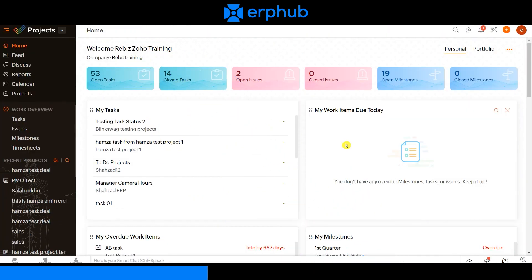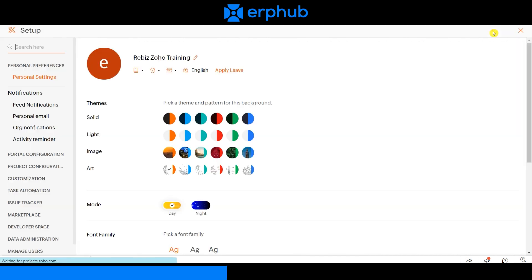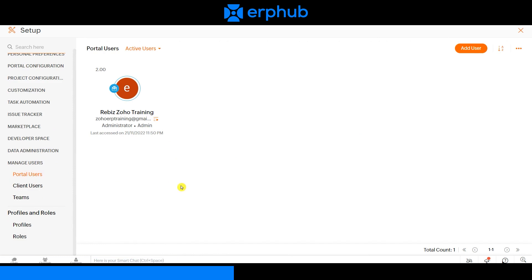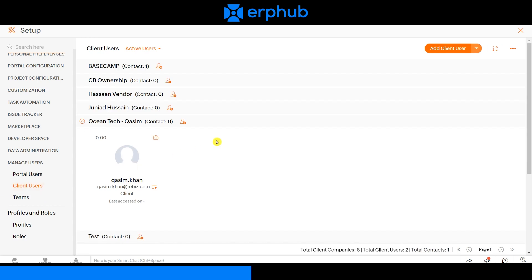We are currently on Zoho Projects. Before you begin using Zoho Projects you need to add users onto your system so you can assign projects to your team members. To manage your users, navigate to the setup icon on the top right corner, scroll down to manage users, and under portal users click add user — it will take you to Zoho One where you can add new users. If you have clients that need to view and engage with projects, you can add those users as well under the client users section.